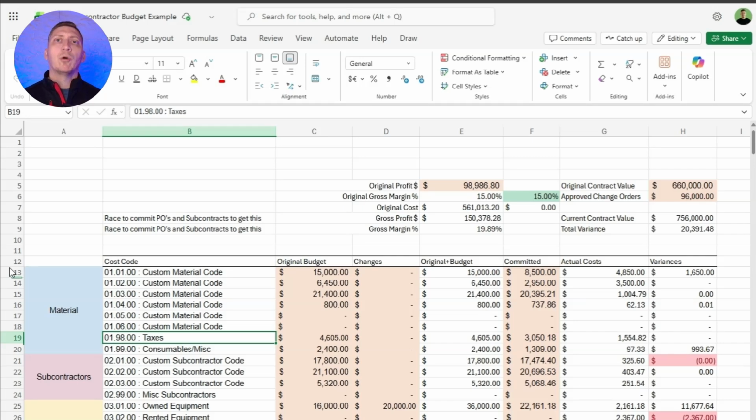But that's the power of job costing. In the first 10% of a project, in the first 3 weeks, I knew that was a problem to ask. The field saw it was a problem. Everybody who was looking at the financials was like, what's going on? Why is this happening? And it's just the red flag. It's not right or wrong. It's just that when we were 1 month into the project, we had time to correct and change course.